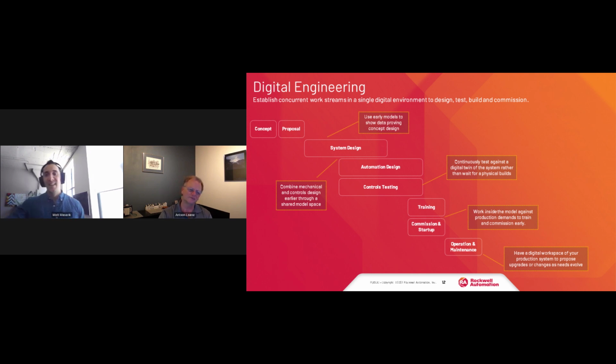So what we do in the workflow in this scenario is we receive some drawings from mechanical engineering. We will mark those up and get them ready for controls testing, and we'll play that markup back to mechanical engineering so that when mechanical makes a change, we receive the marked up model back so we can quite easily adapt to the changes they've made.